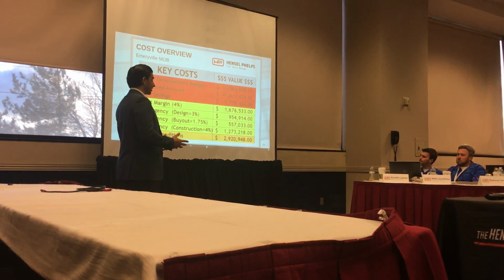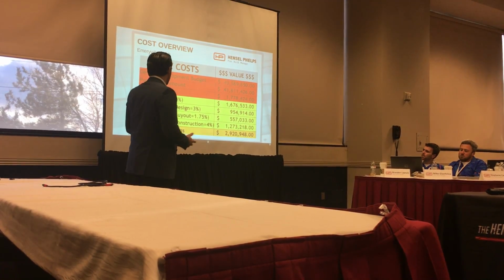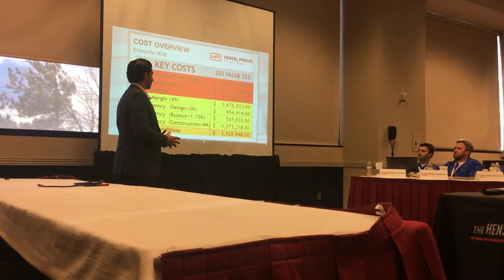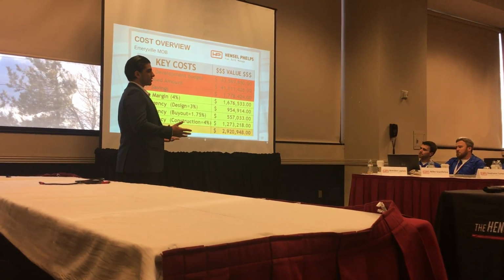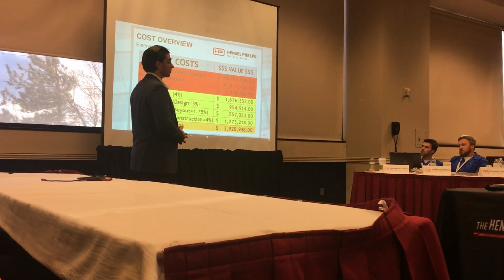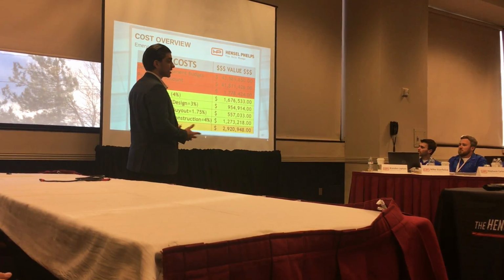Now that may seem a little bit low to you, but considering the fact that our buyout is almost over 90% complete, we don't see much risk left over there, and so 1.75 is reasonable. In terms of profit margin, we went with 4%. We felt that the cost of the project being at around 42, this was a reasonable number. Today's standard market for this type of job, I believe, would be around 4 to 6, but considering we're jumping into construction, we wanted to make sure to stay competitive with any other design build team that was considering trying to bid this out. Then we have our main important contingency at 4%.